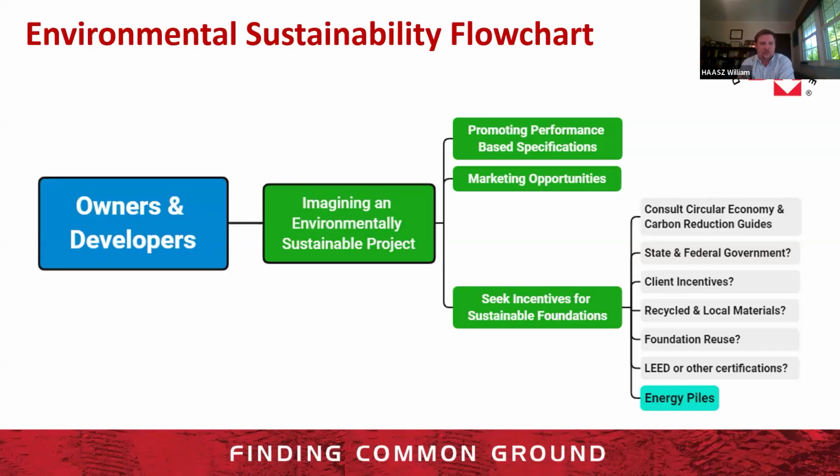Because when you're incorporating energy piles, it has a huge cascading effect on what needs to be done for structural, the foundations, architectural, mechanical, plumbing, all of that stuff, right? I'm not an energy pile expert, but from what I've seen, it can be quite expensive and exhaustive to get to the time where you have to install piles and then say that you're going to use energy piles, right? All the HVAC, the design that goes into that really needs to be envisioned on the front end. So that's owners and developers.